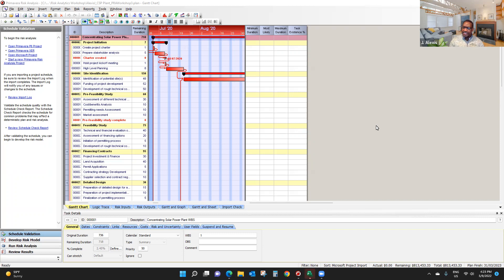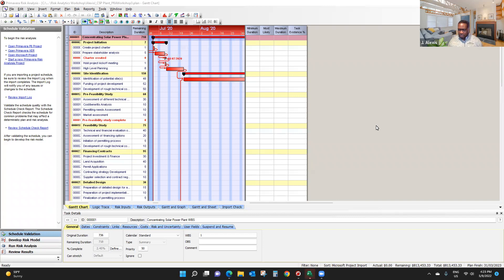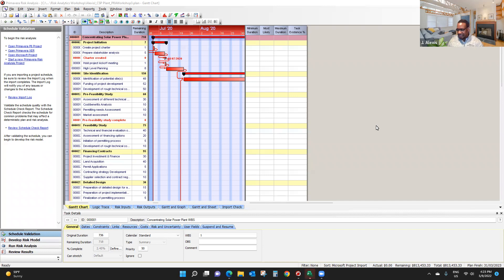Uncertainty modeling is about providing three-point estimates or range estimates. So in this case, in Primavera Risk Analysis, we're going to provide what we call three-point estimates.